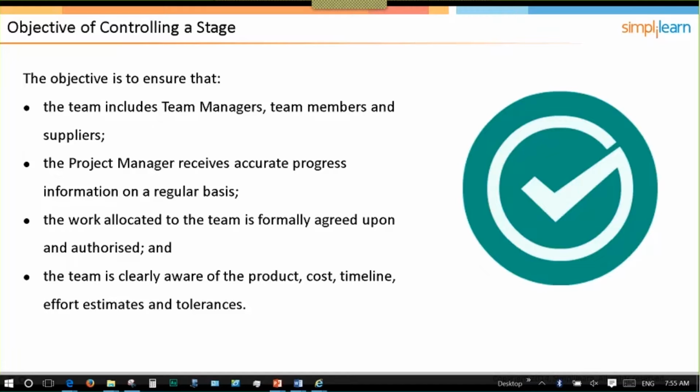So we want the customer to feel the product first and then give their inputs, so that we can go further and do their enhancements. Yeah, absolutely. And that's why under PRINCE2, regardless of your methodology, whether you're using waterfall or agile, you still need a product description. It may be a general description, and then you're tweaking the features that you're including in it according to your sprint. So in other words, you could be treating it like a work package as to specifically what you're going to include in the next version of it, but you still should have that approved, what your user is expecting, before you start the work for that sprint.